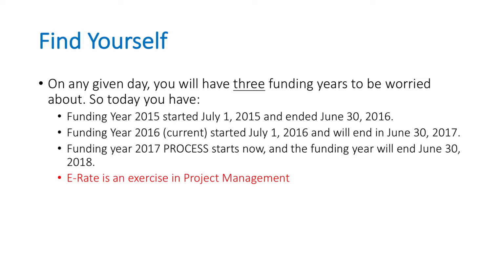At any given time in an E-rate cycle, at any given day, at any given time of the year, we are working basically with 3 funding years. For example, funding year 2015. That is finishing up. In most cases it's probably done, but sometimes there are some lingering funding commitments, or some invoicing on the BEAR forms, and some extensions on the BEAR forms you need to fill out. So that might still be an open opportunity to finish those up.